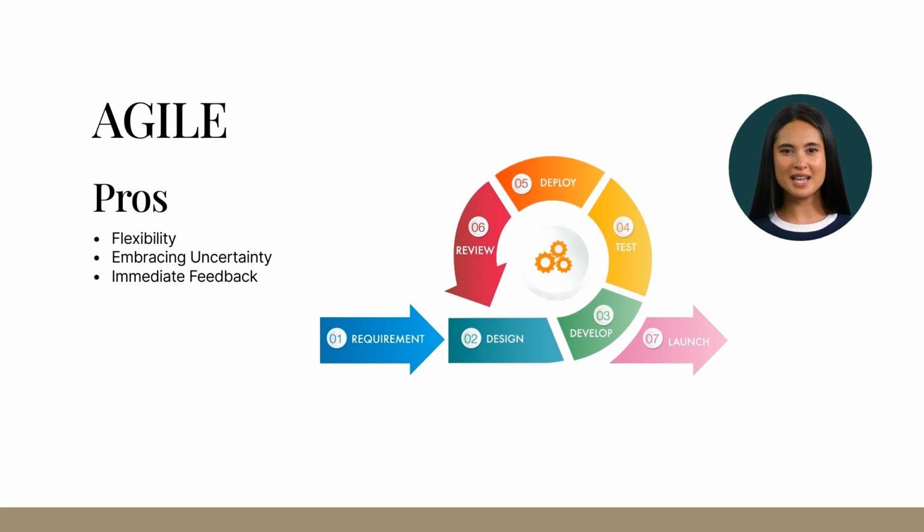Immediate feedback. In certain Agile methodologies like Scrum, development occurs in cycles, each resulting in a module in its ready-to-release state. This state is attained through continuous testing and feedback from both customers and stakeholders. After module development, these individuals participate in evaluating it, offering comments and suggestions. Developers collect and assess these inputs to determine viable changes. This iterative cycle repeats until the final module emerges as a finished product.